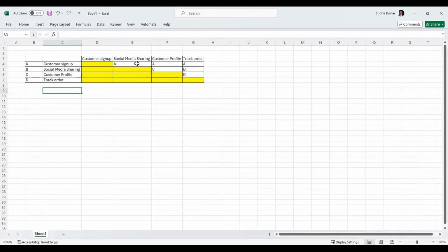Now tell me, which requirement is rank one here? Customer sign up, A. Customer sign up has 3 counts, so rank one. Just write the rank directly. Put ranks here. Customer sign up, first rank. Then second rank, track order. Third rank, customer profile.